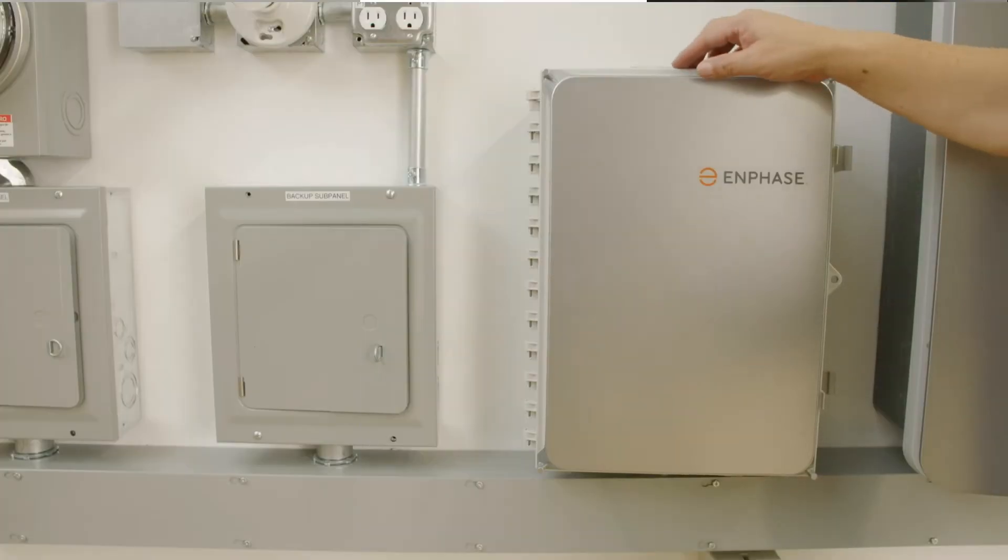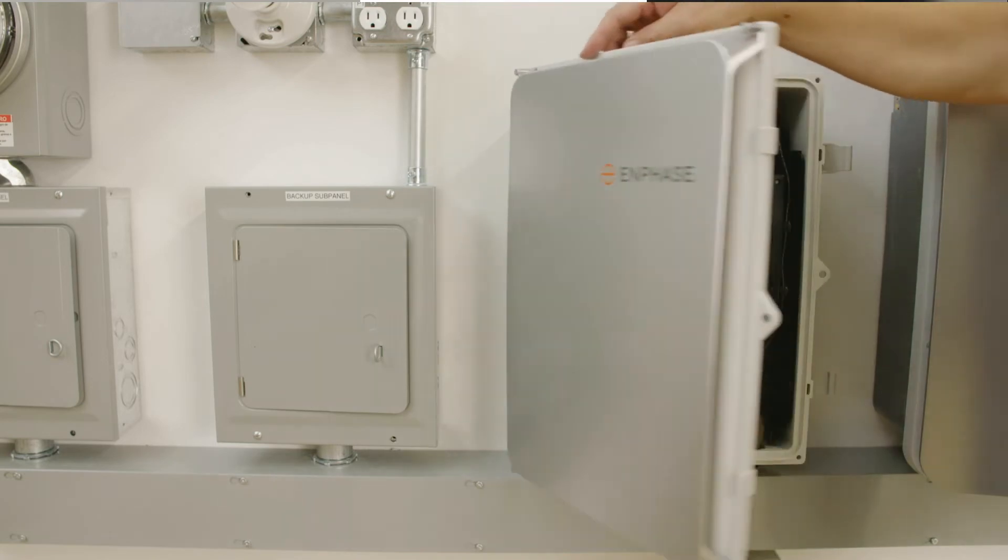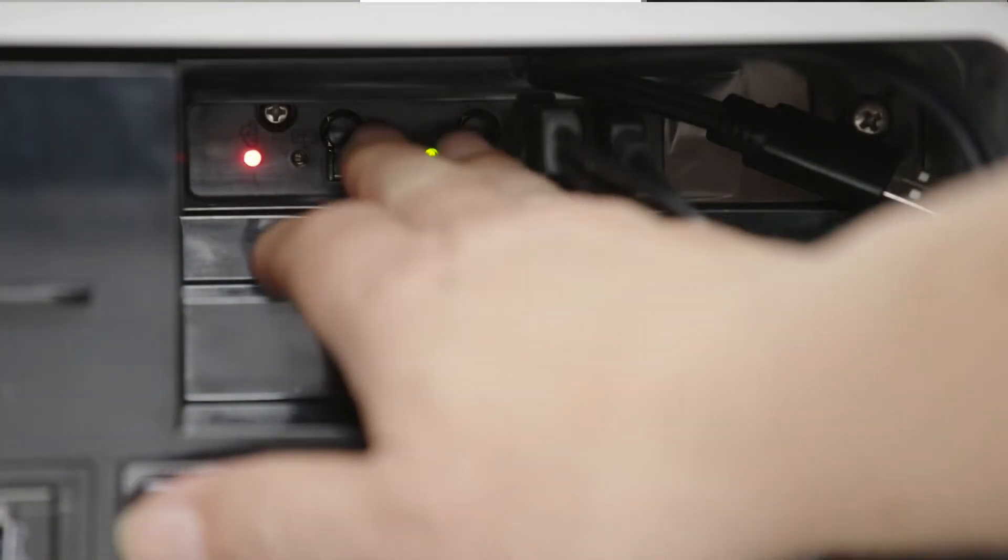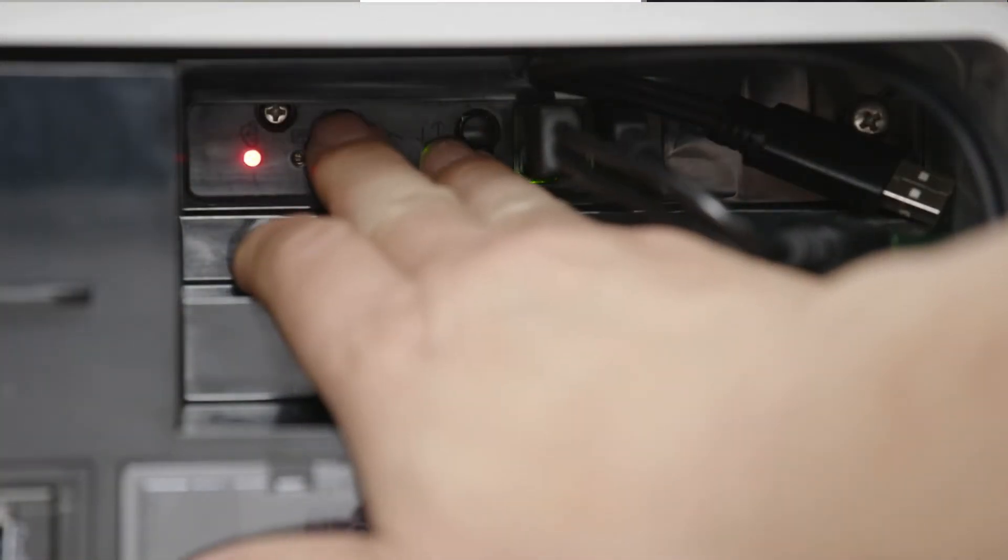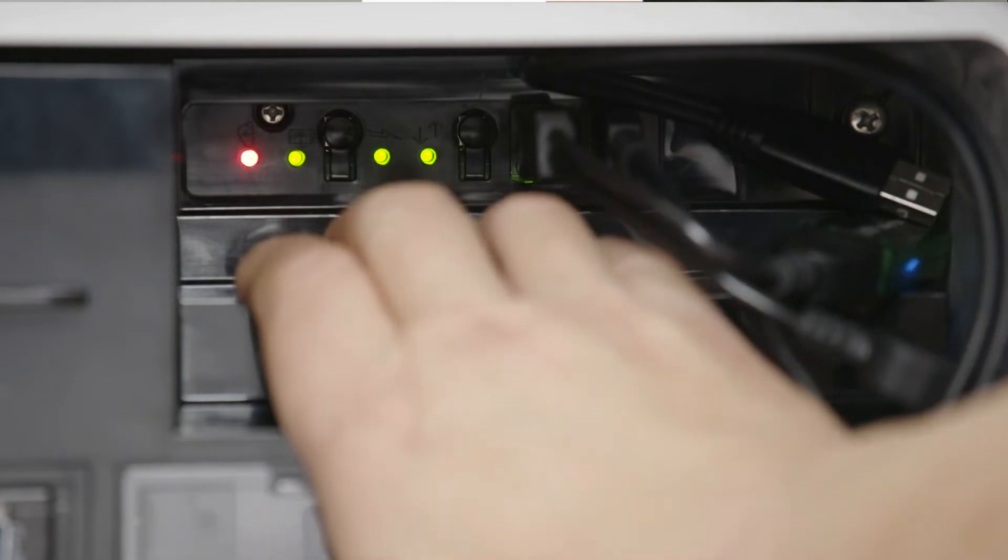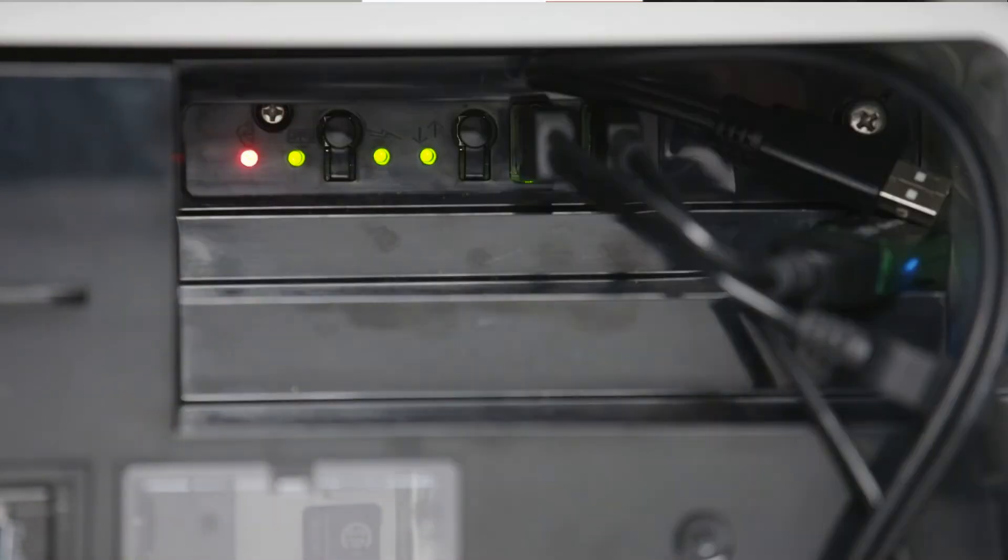Locate the gateway in the AC Combiner and press the button on the gateway briefly and release. The green light will turn on, indicating AP Mode is now on.